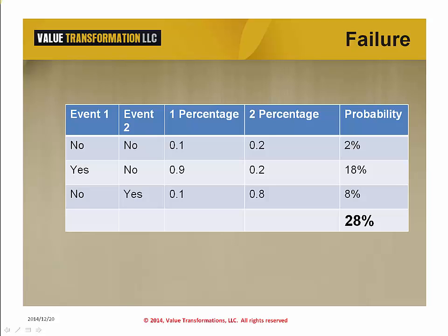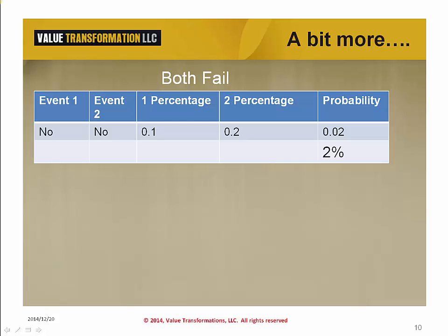As the number of depending tasks go up, the resulting probability of success is the multiplication of each of those task probabilities. We see that the probability of success of both depending tasks is 72%. That is not the end of it.